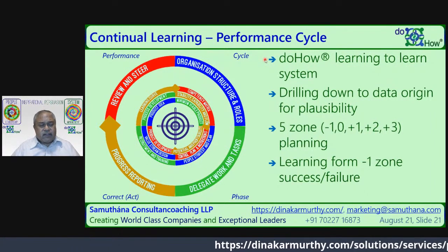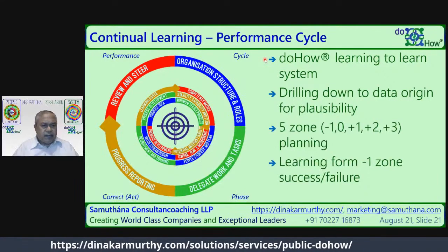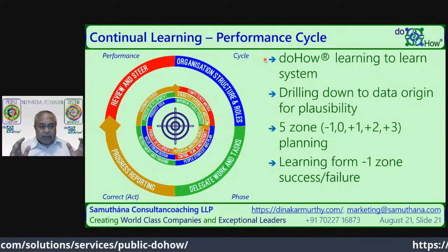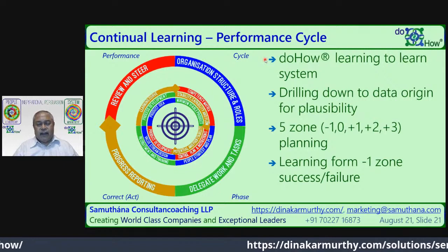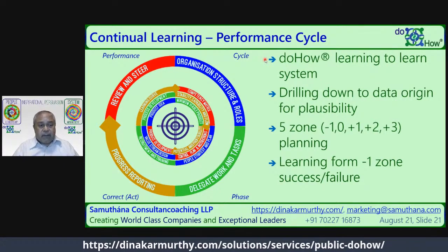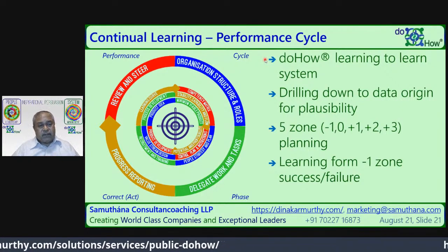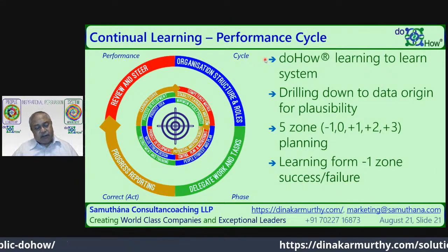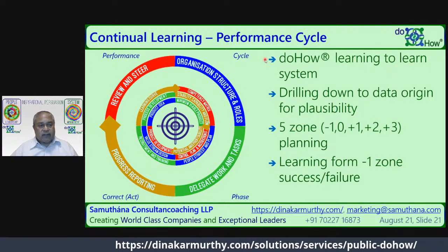Full kitting is talking about whether all the items, documents, decisions, information, materials required to perform a task are available or not. Is it available as a full kit? And that automation can be easily done in computers, and that's something where again smartness can be brought in, because that brings in a lot of ease for the purpose of scheduling and for the purpose of executing a task, because these reports can be generated much in advance and escalations can be done automatically, so that the task gets completed and the full kit is always available before the task gets started.